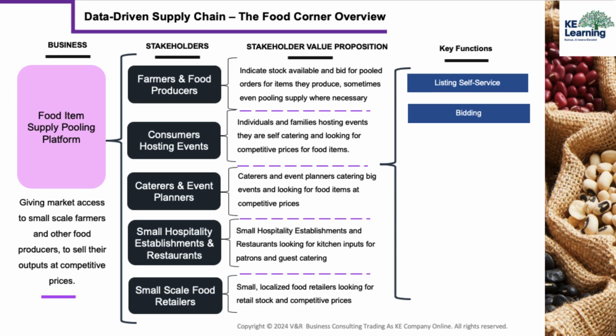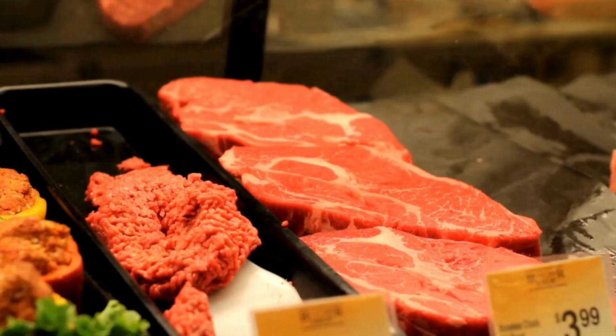They also have a bidding tool that the fulfillers use as a procurement tool, where different items are loaded at a price per unit metric. They send a notification to suppliers with the required item details and required quantity, and each supplier bids a price per unit metric for different quantity levels, as well as the maximum quantity that the supplier is able to supply for the given order. There's also room for negotiation, where suppliers can be asked for their best price.